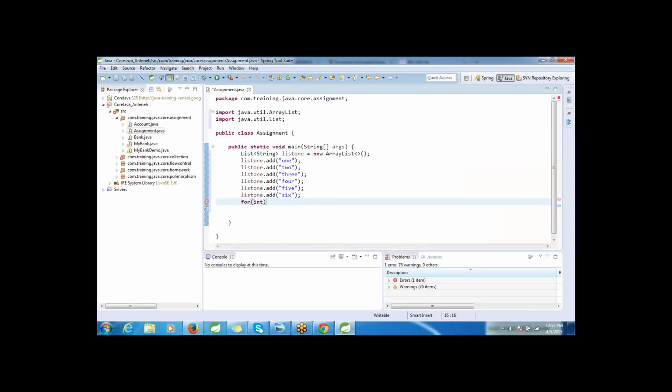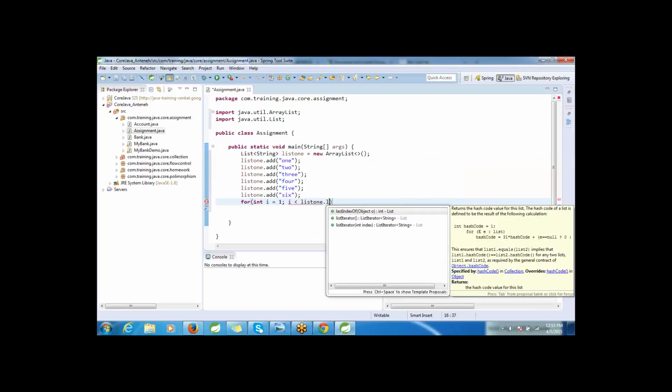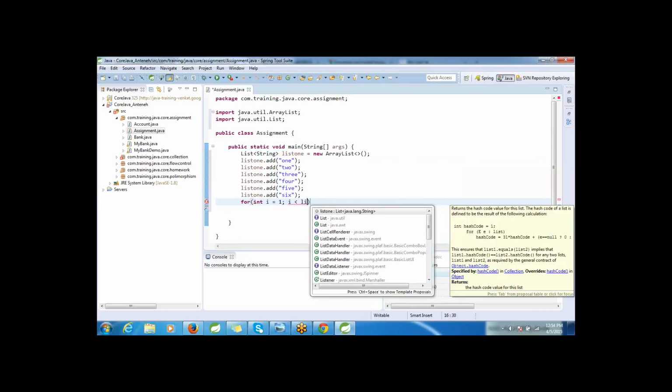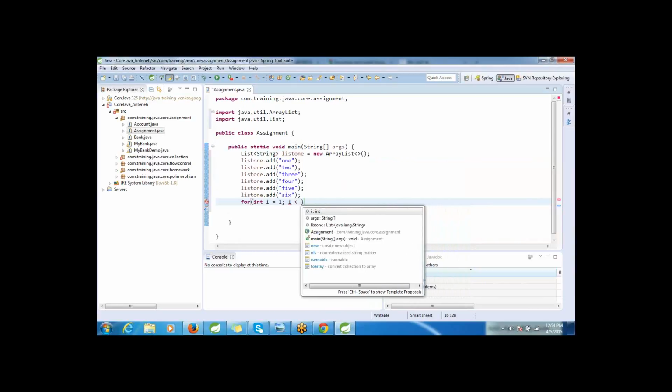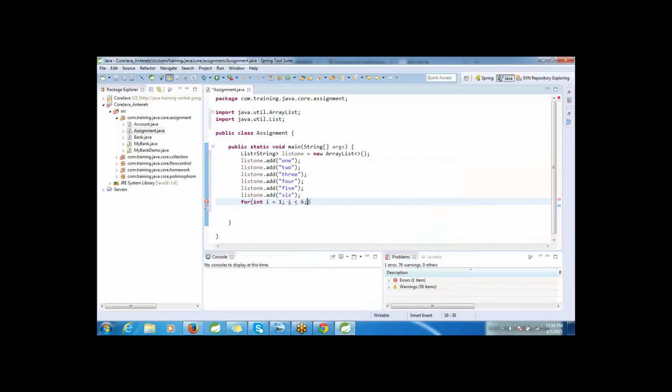You take assignments, and then what do you do? Actually, I have a few tasks tagged to my name. Say suppose there are 10 tasks, and the team consists of 3 developers, so the tasks are divided among the 3 developers. The tasks assigned to you have to be completed in that sprint duration of 2 weeks. Every sprint runs for 2 weeks minimum. In that time your development, coding, testing, integration, regression testing, white box testing, everything has to be done completely by the end of the 14th day.